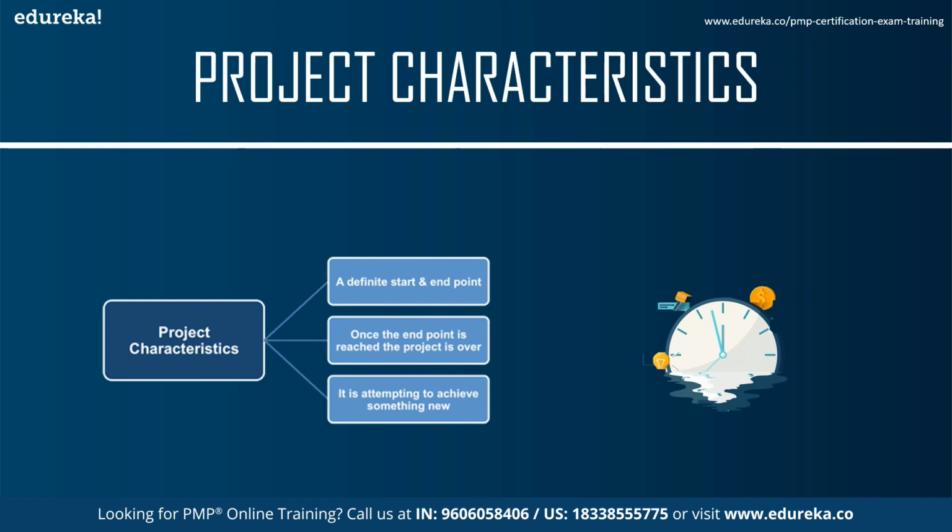The second question is, does the project have a limited time frame? The answer would definitely be yes. The start date of this project is today and it will end by the end of next year. It is definitely a temporary endeavor. Third, is there a way to determine when the project is completed? Yes, the kiosks will be installed and the services will be offered from them. So once all of these are installed and operating, the project will come to an end.